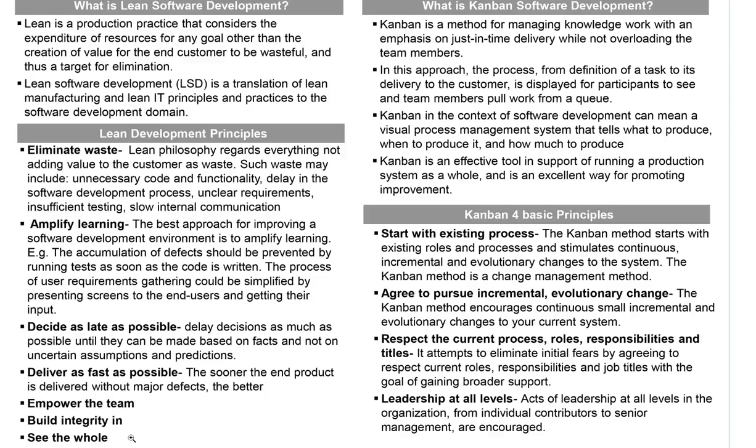But in whole systems, all the end users or stakeholders are involved from the start to the end. It's not like the contractor looks at the project only when the drawings are complete and the permit is received. The contractor should be involved from the beginning, so he can already give input: hey, architect, you're putting this over here, and I know there might be a problem with this. The end users are also part of the whole design process, because they are the ones who are going to use the library, so they will come up with their reasons as to why the design should be updated.